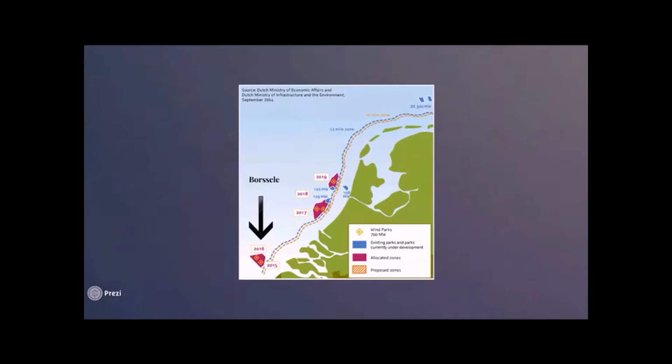Since this is a project instigated by the government, a lot of the preliminary work and cost will be covered by them and by TenneT, the network operator in the Netherlands. This includes the research into the soil and wind conditions and also the very costly export cable to the shore. This makes building a wind farm at this site a very interesting opportunity, which Eneco and Mitsubishi will seize.